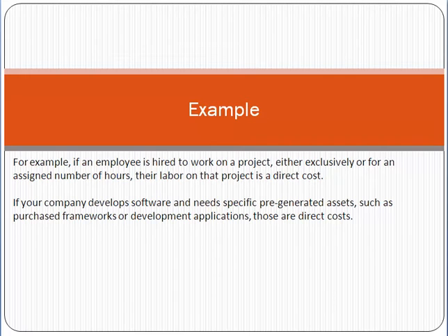Whether the employee is hired on a contract basis or a permanent basis, the hiring of an employee to work on a project is a direct cost. For example, you have got a project to implement an e-commerce solution, so you hired a software manager and three developers. Hiring of the software manager and three developers, why? Because it pertains to project management and project implementation, so that is called a direct cost.